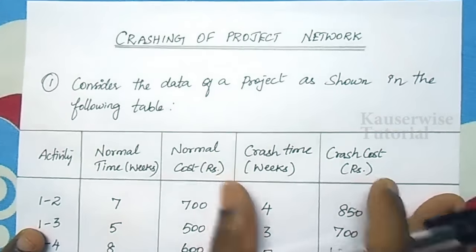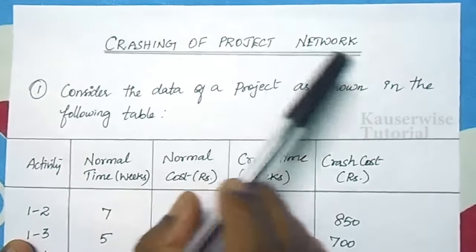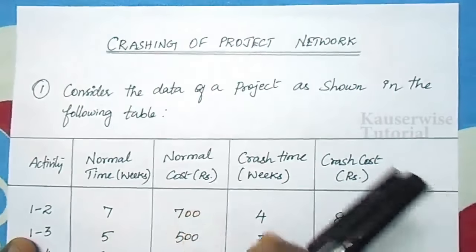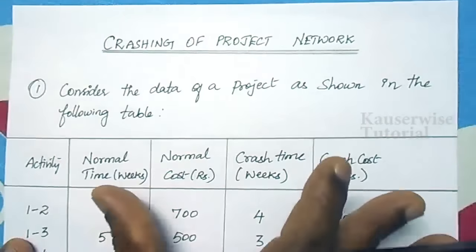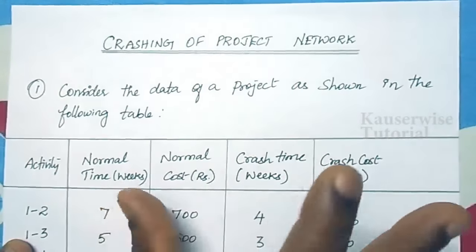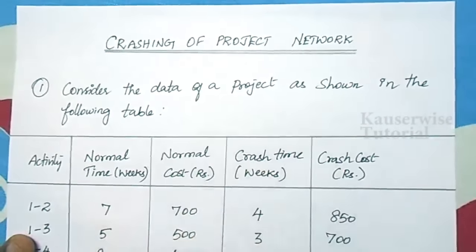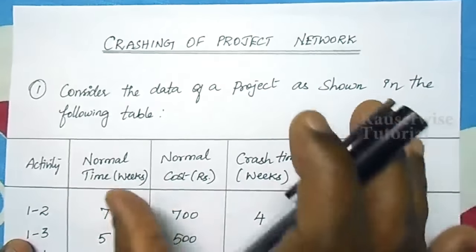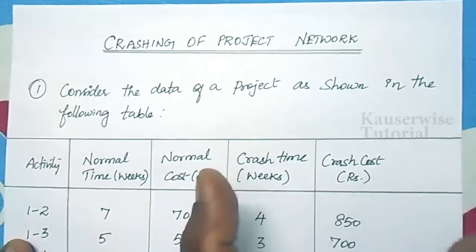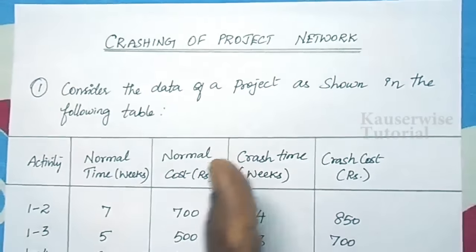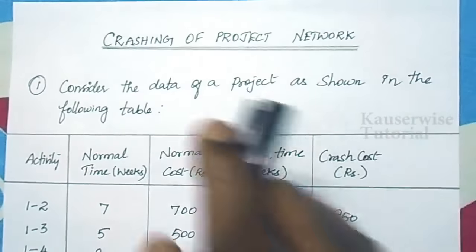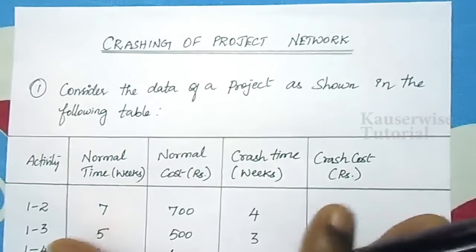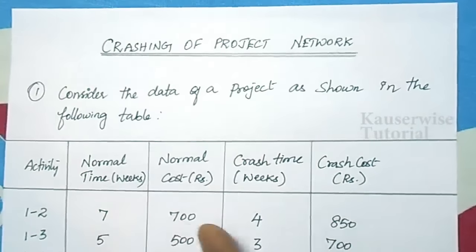In this video, we are going to see crashing of a project network. Generally, in any project network, the first step is to determine the critical path with normal activity timing. Then, when we execute the activity, we can speed up the activity timing in order to reduce the total completion time. This is called crashing of a project network.